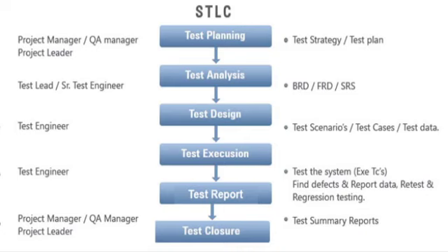That is about overview of test design. The next phase is test execution. In this phase, testers are going to execute the test cases and test scenarios in four levels. There are level 0, which is mock testing, level 1, which is real testing, level 2, which is retesting and regression testing, and finally level 3, which is final testing.